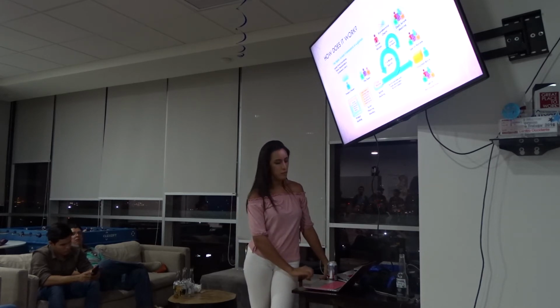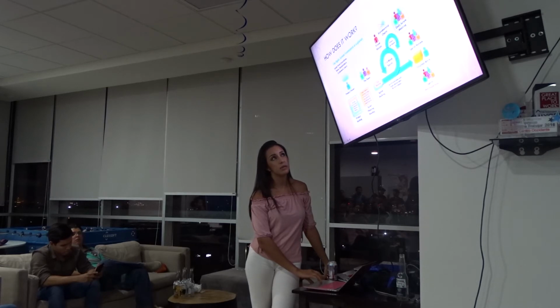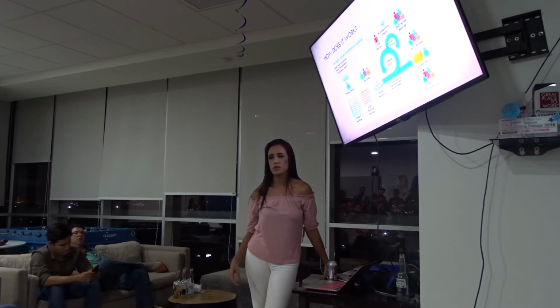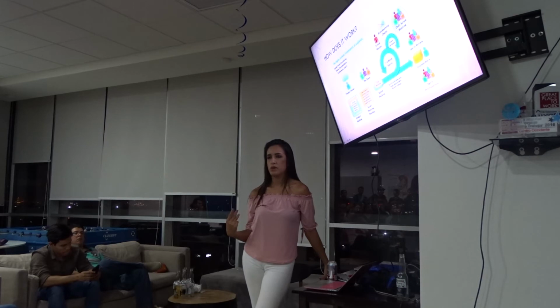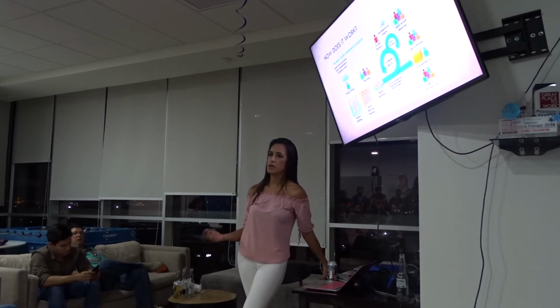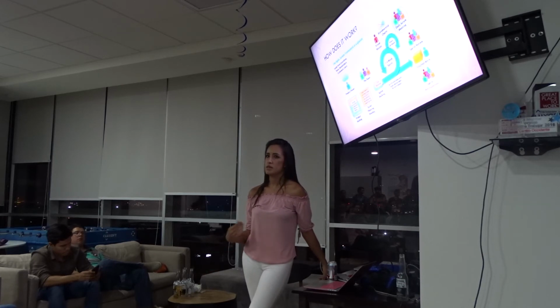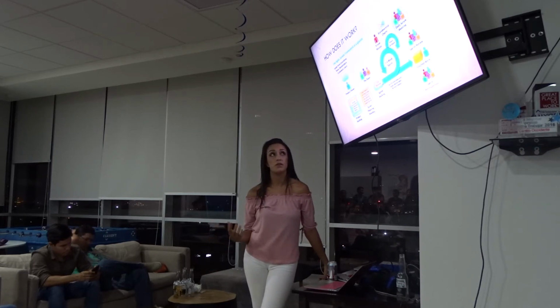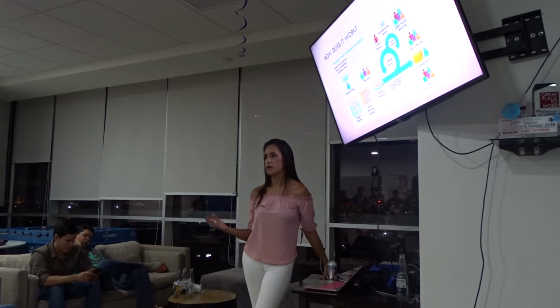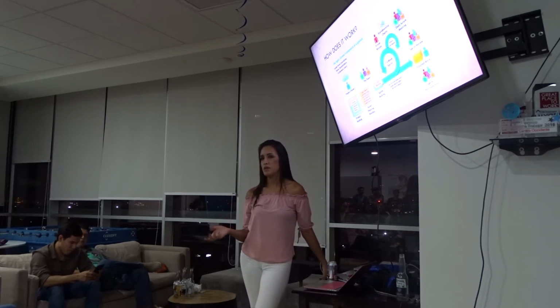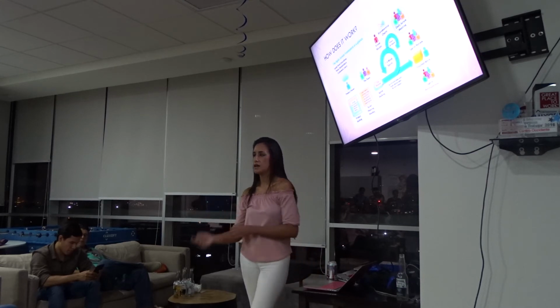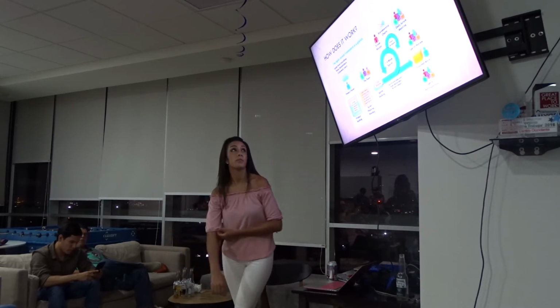And every 24 hours, there's a daily Scrum meeting where the team participates with 3 questions: what I did yesterday, what I am going to do today, and if I have any blockers. That's for the team, so the whole team can know what you're working on, if there are any blockers, if he or she needs help, or if maybe sometimes you're developing something that he's already done and he can help you.